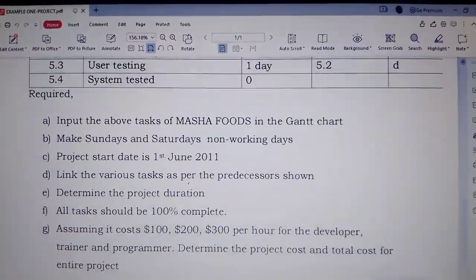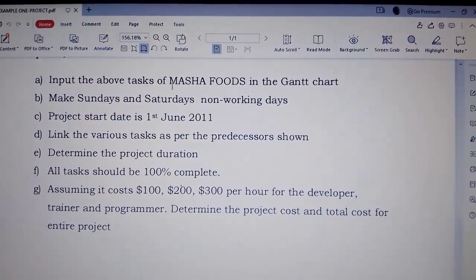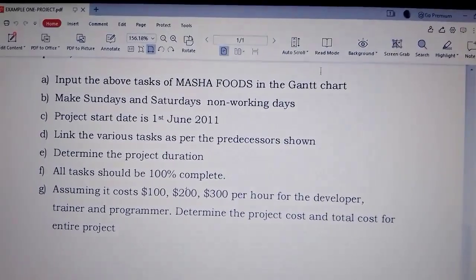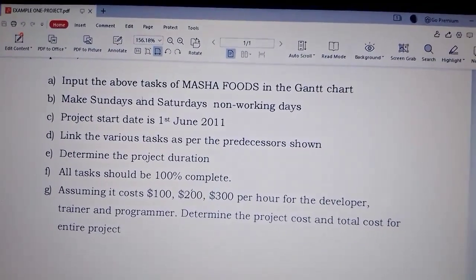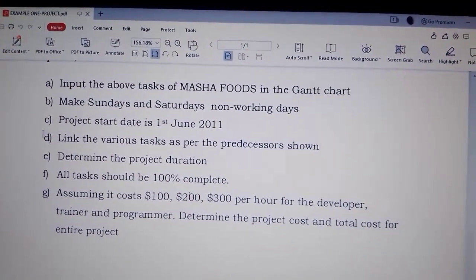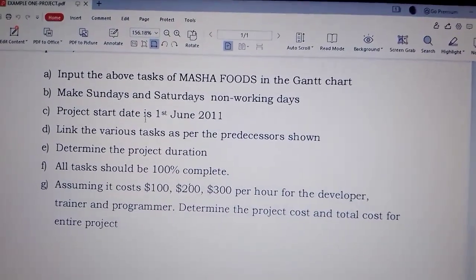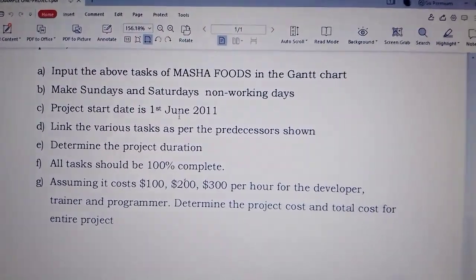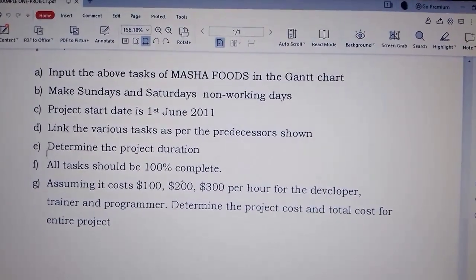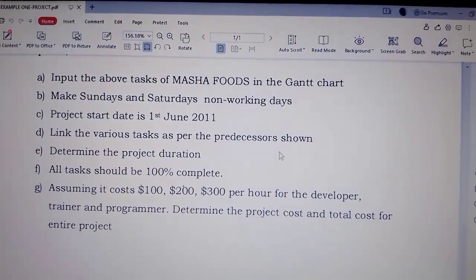So required: they want us to input the above tasks of Marsha Foods in the Gantt chart. Then make Sundays and Saturdays non-working days. The project start date is 1st June 2011, so it will be our start date. Then link the various tasks as per predecessors shown.